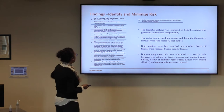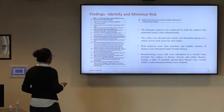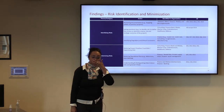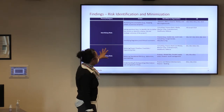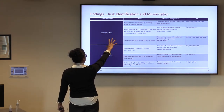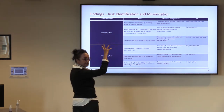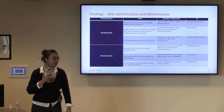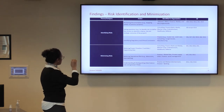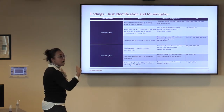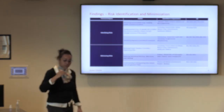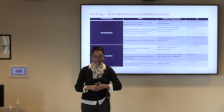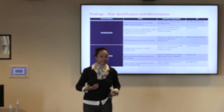In total, we found 16 risk management processes for data science projects. Another finding was that we could create two categories: actions taken to identify risk, and actions taken to minimize risk. Across participants, asking questions was a common theme — at the commencement of a project, they would sit together, brainstorm, and pave the way to the next step.